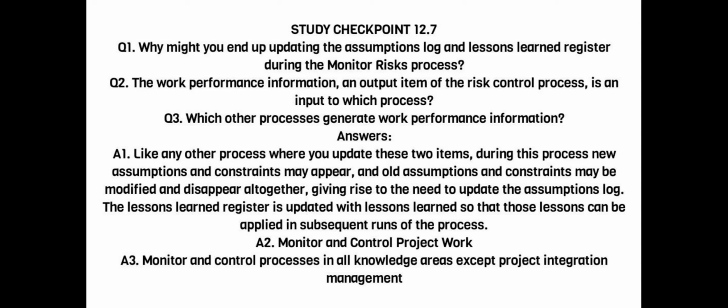Answers. A1. Like any other process where you update these two items, during this process new assumptions and constraints may appear, and old assumptions and constraints may be modified and disappear altogether, giving rise to the need to update the assumptions log. The lessons learned register is updated with lessons learned so that those lessons can be applied in subsequent runs of the process. A2. Monitor and control project work. A3. Monitor and control processes in all knowledge areas except project integration management.